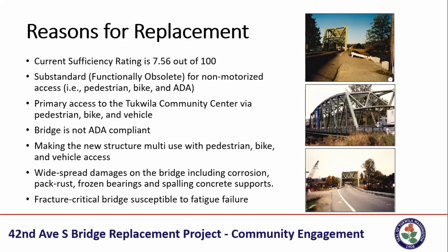Again, as Hari mentioned, we don't know how many years the bridge can go on. The city is doing a very good job monitoring the health of this bridge right now, and they have reduced the inspection interval to 12 months as opposed to 24 months.